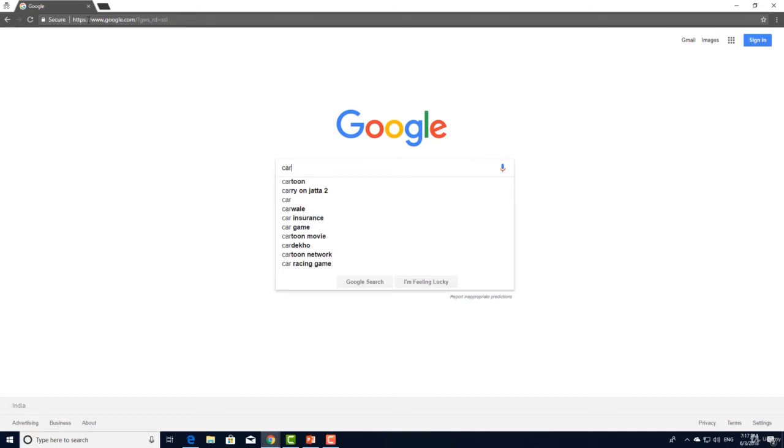Initially when we estimated the project, this functionality based on Ajax was not estimated because this requirement was not there. Now we had a requirement for search, and we had a requirement traceability for that search requirement. Now we will update that traceability with this additional information to make sure that this is also tracked and maintained.